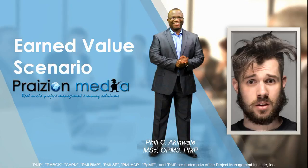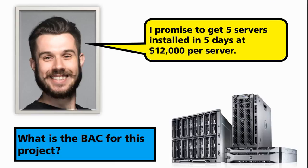Dan is an IT project manager. He's having a bad hair day in earned value. But it doesn't start off that bad — it starts off well, with him making a promise. He says: I promise to get five servers installed in five days at $12,000 per server. There's a term we use in earned value known as BAC. BAC is extremely important in earned value because this is the basis of your promise. In fact, this is your promise.